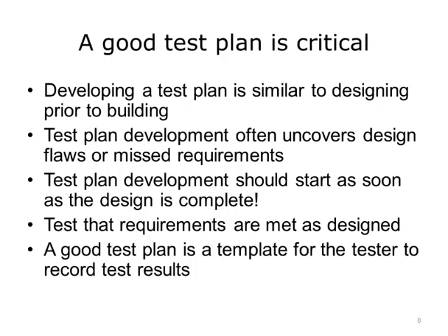One of the most important steps in testing is to plan the test. The test plan development work can begin as soon as the design is done. The design document is a helpful basis for the test plan. Sometimes creating the test plan will actually uncover flaws before any testing has occurred. The goal of the test plan is to fully test that requirements are met as designed.